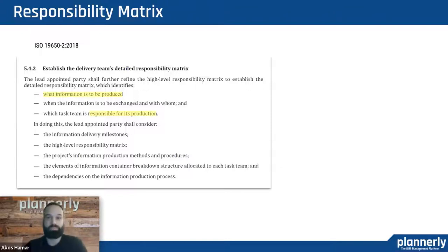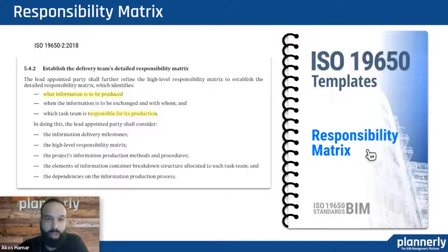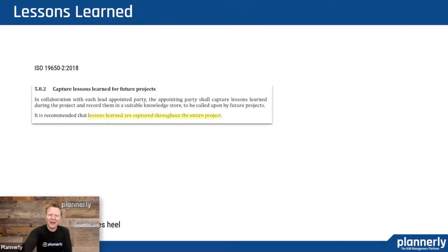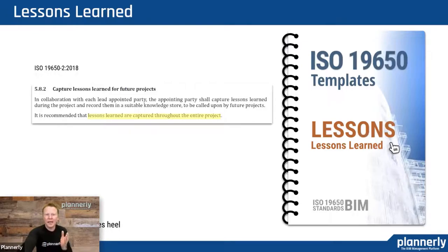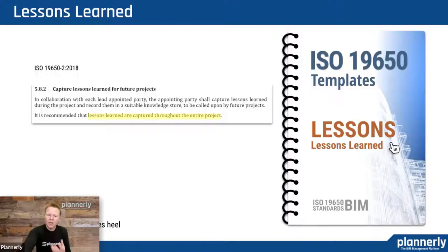And then the responsibility matrix — that's actually pretty much the essence of Planoly: the right BIM at the right time by the right people for the right reasons. Really, who is doing what, for what purpose, at what point in time — that's what we can document in Planoly and visually communicate to other project participants. The last one is lessons learned. Our industry has this Achilles heel: every project team is created, does great things, learns a lot, but then is disbanded at the end. So we have lessons learned templates and workflows to capture all the way through the entire project, so teams can go back to similar projects before starting a next one and understand what they can avoid.